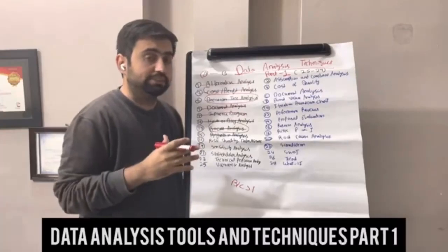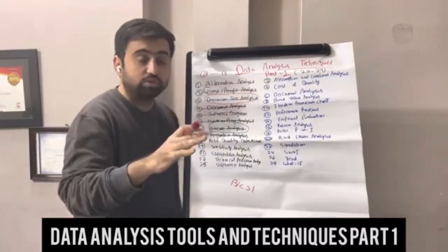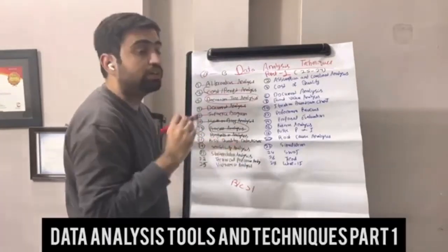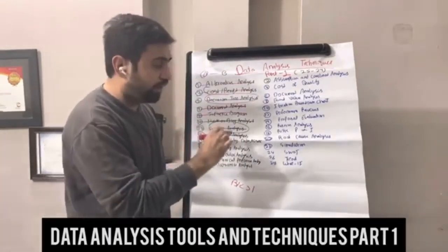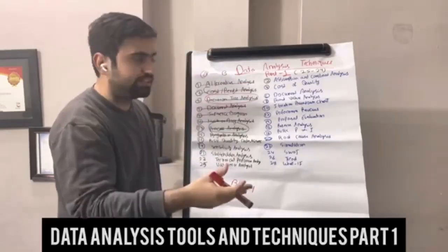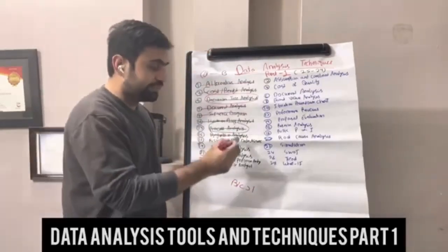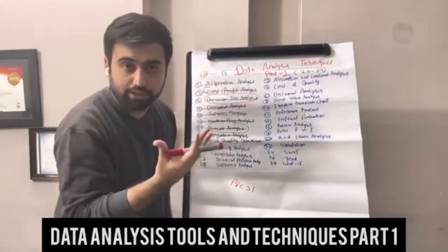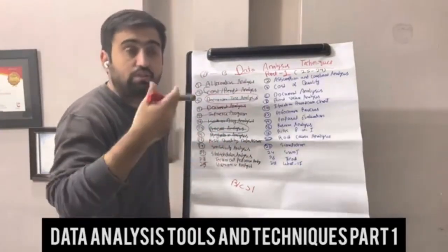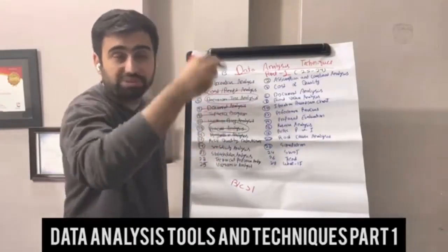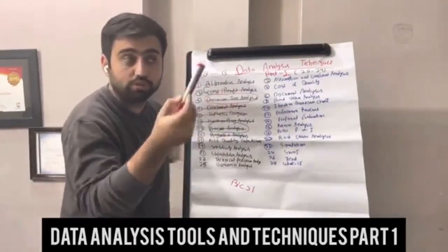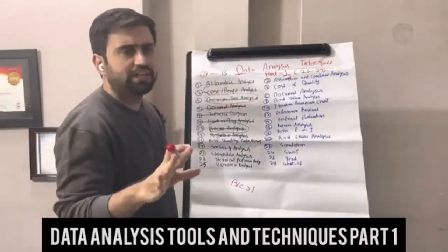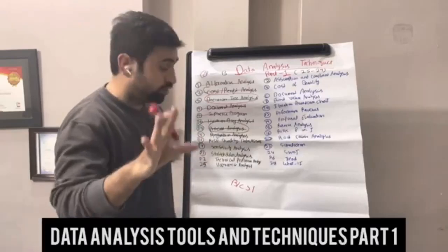In order to overcome this, in order to make sure that whatever we are doing has value, we do risk data quality assessment. We make sure that all the data is of high quality. We review document analysis. We ask for expert judgment. We try to make graphs, maybe through control charts, and put the values of the data through various ways. The purpose is that we check our data. The data is not skewed.